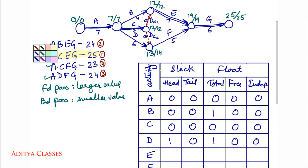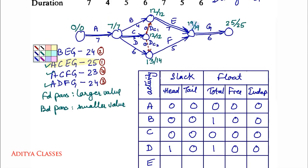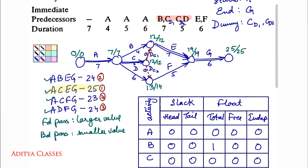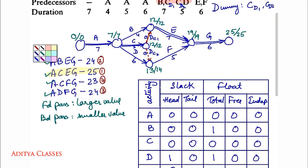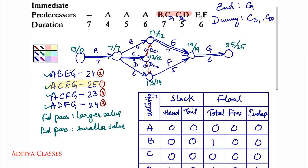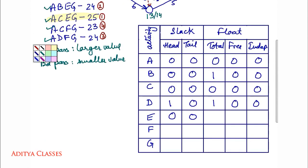For activity E: head slack is 19 minus 19 equals 0; tail slack is 12 minus 12 equals 0. Total float: 19 minus 12 minus 7 equals 0. Free float: 0 minus 0 equals 0. Independent float: 0 minus 0 equals 0.